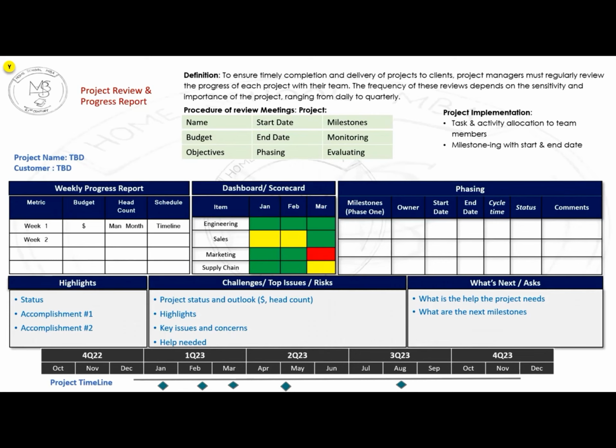So the team members must know, and they must get a fair chance to prepare for it. It's not simply that you have decided that there will be a weekly review meeting, and that's all. Every week an agenda has to be prepared for the meeting, and that agenda has to be provided to the team members, so that they come prepared. In such a type of meeting, there will be two or three different types of progress that you would come across.